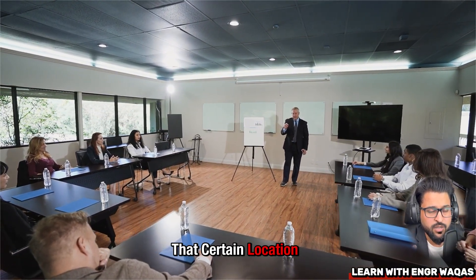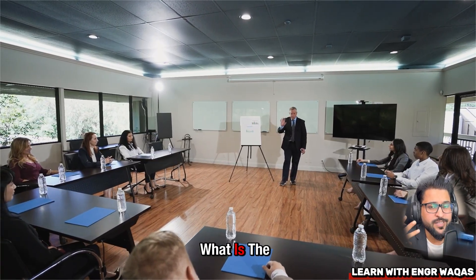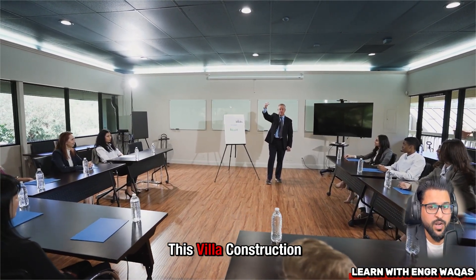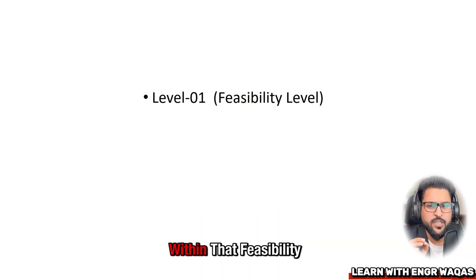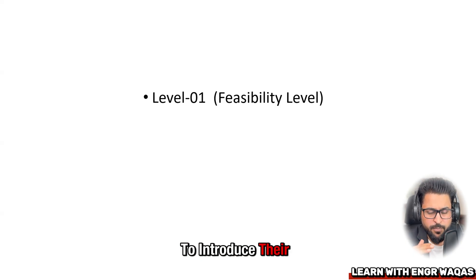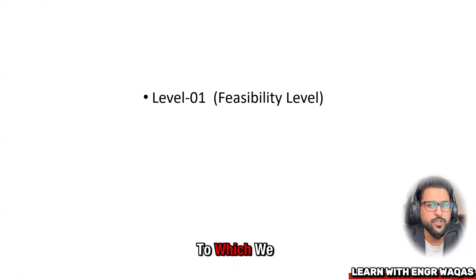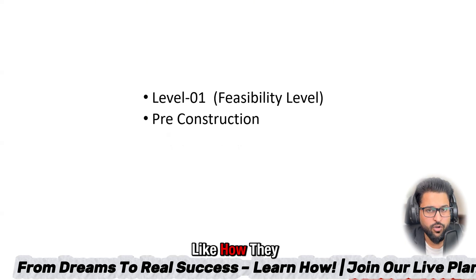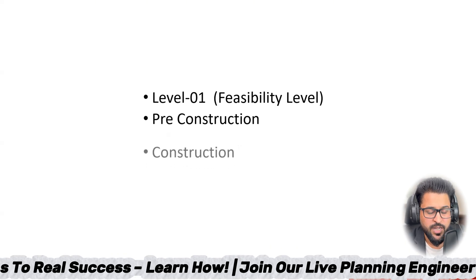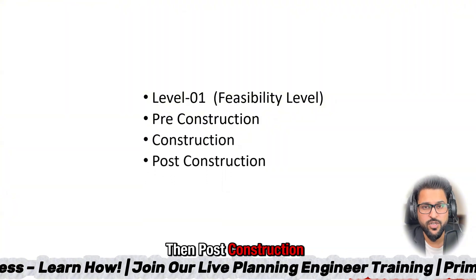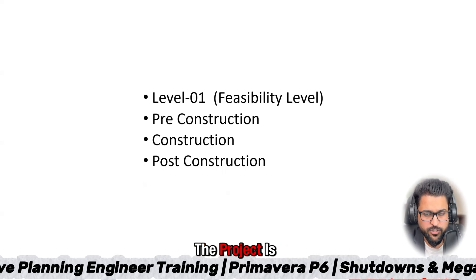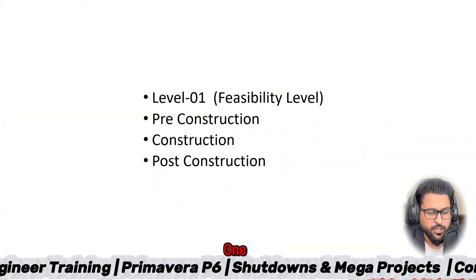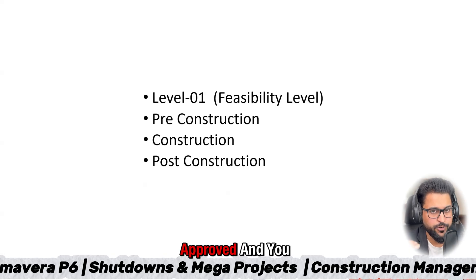Within feasibility for this villa construction project, they discuss the need to construct, why they chose the location, what the future outcomes are, and what revenue and profitability the project will generate. Within that feasibility stage, they introduce a very basic level schedule called Level 1 scheduling: pre-construction, construction, and post-construction after delivery.